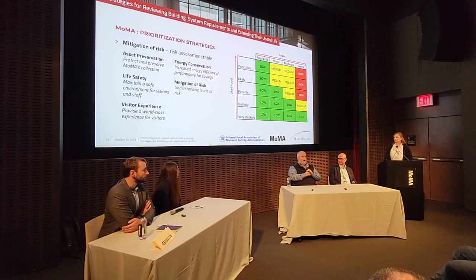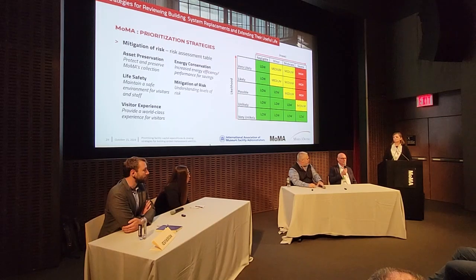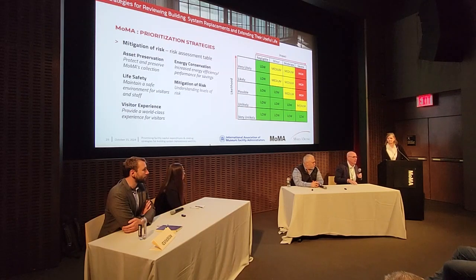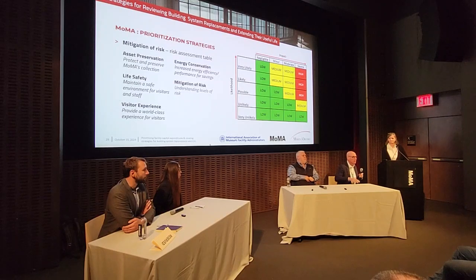And the other thing was the cost. Our costs are immediate, we give them costs. Yeah, and I would say, remember when you're defining projects from an FCA, the scope and the time and effort that Marx Okubo put into the process, while it was enormous, doesn't define all the scope. When you replace this unit, by the way, you also have to replace all the piping to it, or there's asbestos to it. So a lot of that stuff got, I want to say got lost, but it was inherent.